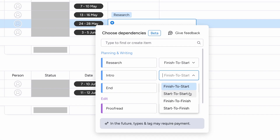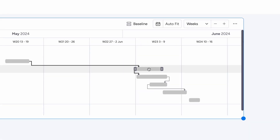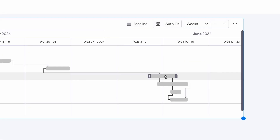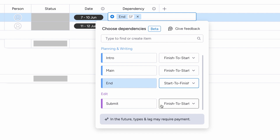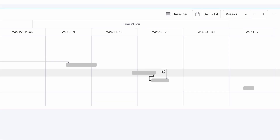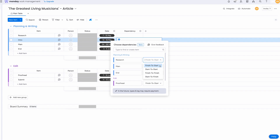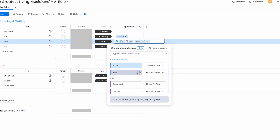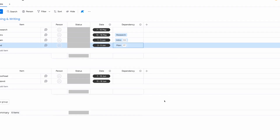For start to start, the child's timeline start date will move when the parent's does. This is the same for finish to finish, except it applies to the timeline's end date. Start to finish will move the finish date of the child item when the start date of the parent does, though this one has limited use. We also wouldn't recommend setting an item to have more than one dependency, as this can potentially cause items to move more than required. With that set, you will now see the child item move with its dependent parent. Set this for each item in your flow, and you're good to go.